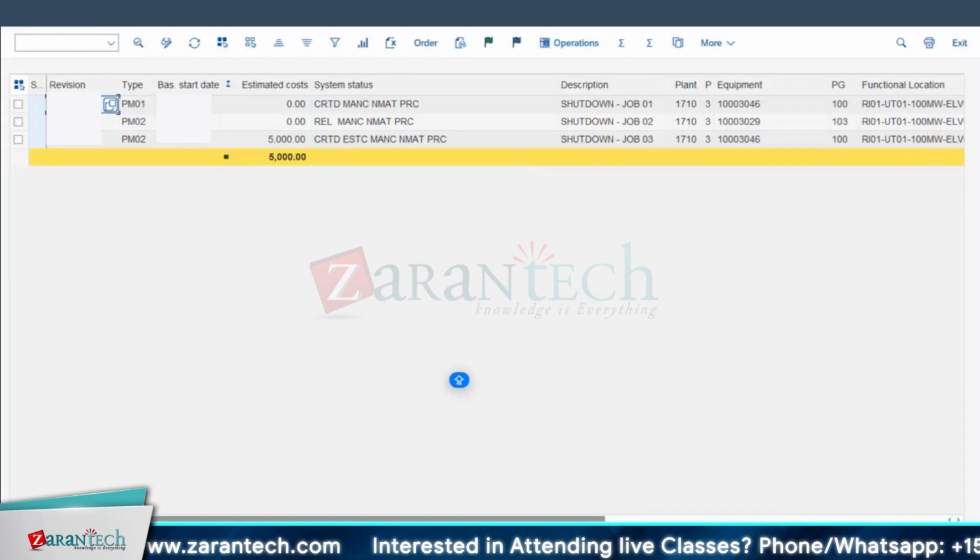See, we are defining a revision duration, right? And any work during that period gets bucketed under that revision. Suppose I have some other order created, say in this example, on the 23rd, one day before your revision starts, and it is scheduled to complete on the 26th. What will happen to those kinds of orders? Is it a planned one, does it come under the shutdown or not? Part of your shutdown, or part of regular work? If it is regular, then you don't assign any revision there.